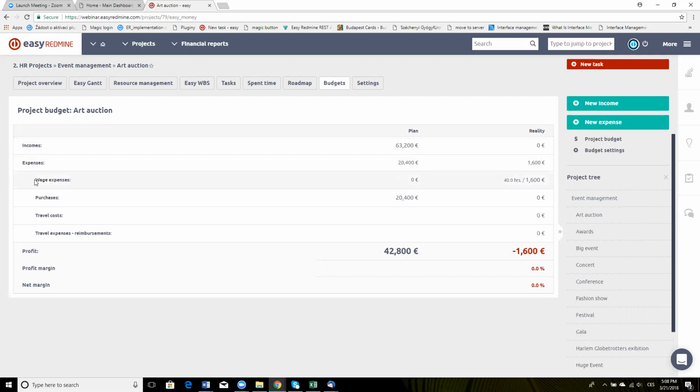In the system, they are calculated as a sum of the personal direct costs on the project. These are meant to be costs for human resources on the project, and the other costs we have on the project, plus also the expenses, especially travel expenses.